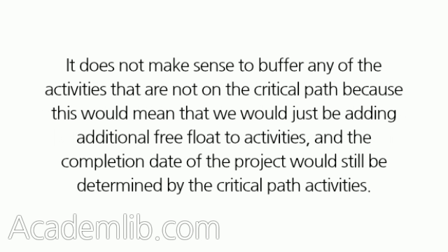It does not make sense to buffer any of the activities that are not on the critical path, because this would mean that we would just be adding additional free float to activities, and the completion date of the project would still be determined by the critical path activities.